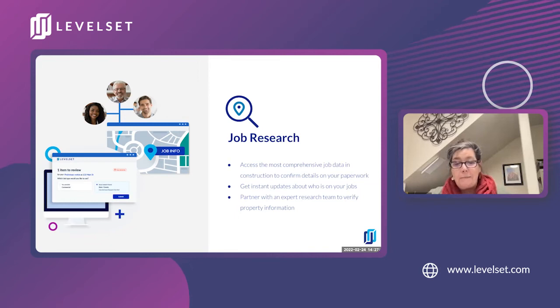information. When we say, "Who's the owner?" and they say, oh, it's me, and my name's John Smith. But in actuality, the scout will find out that the property is deeded to John Smith's family trust. And in Arizona, they are sticklers for even on your contract having that information right. So one of the things with having a prelim for everyone is we have good information to put on our contract also. And there was a time when a tenant hired us to do a job, and we found out the tenant was not the owner of the home before we started, which was a good thing. So yeah, those scouts, they're amazing and they're fast.